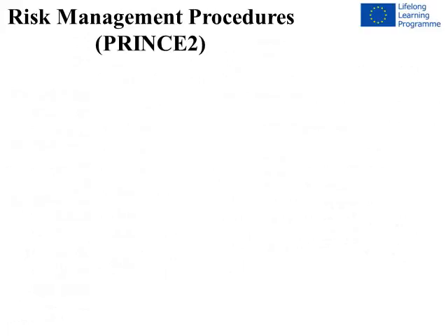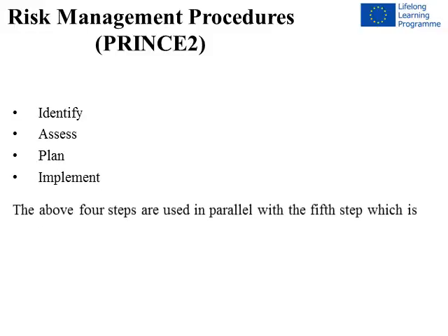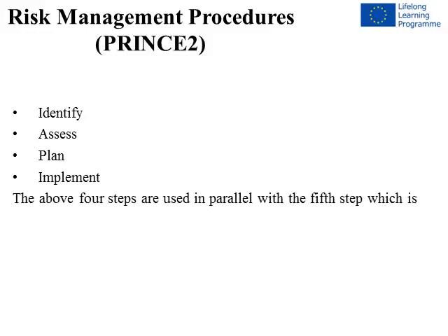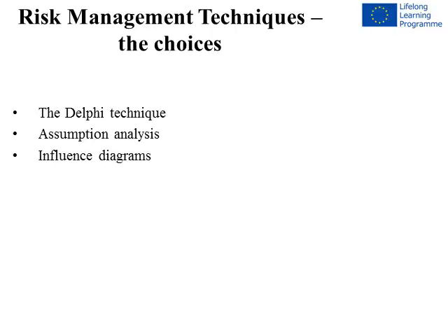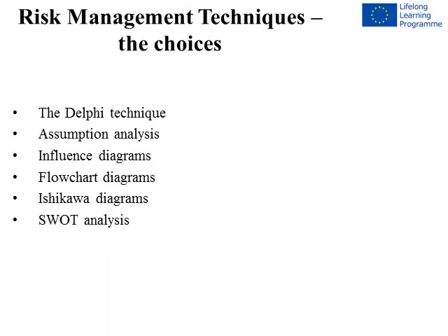Risk management procedures. PRINCE2. Identify, assess, plan, implement. The above 4 steps are used in parallel with the 5th step, which is communicate. Risk management techniques. The choices. The Delphi technique. Assumption analysis. Influence diagrams. Flowchart diagrams. Ishikawa diagrams. SWOT analysis. Tornado diagrams. Monte Carlo analysis.